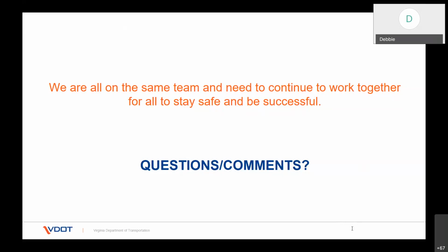Also, if you look at your force accounts, it will give you flagging days. There are administrative fees and engineering fees. We can give you some guidance on what you can expect your cost to be.